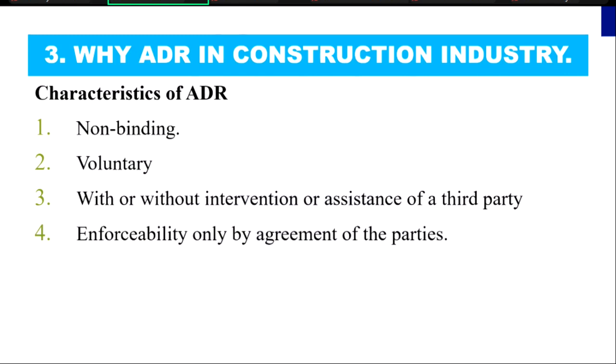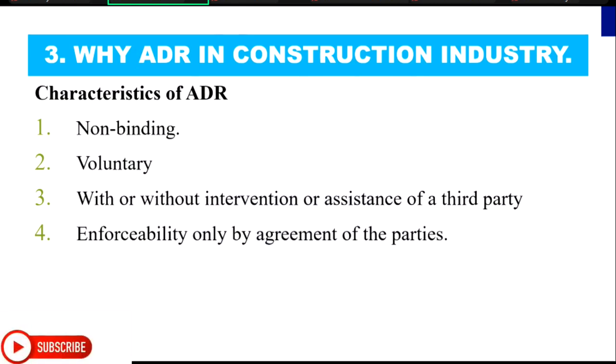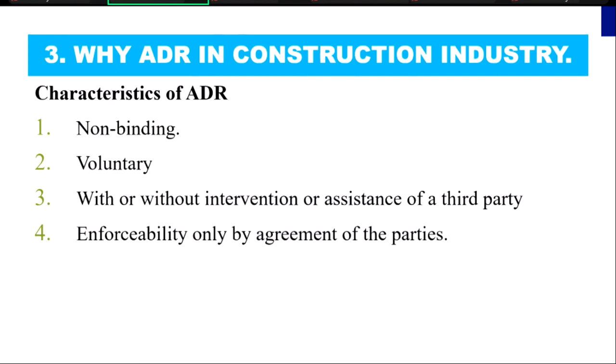The expert determinant makes a determination. But the expert witness just helps the arbitrator to clarify or to bring the subject matter into clear perspective. The expert witness must be somebody who is trained in the subject matter. And as I've given an example, a QS being an expert witness in the determination of the structural integrity of a bridge is not proper. I don't want to delve into others.